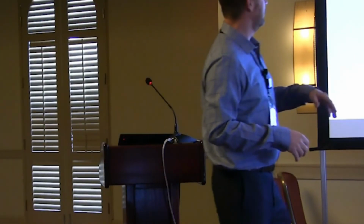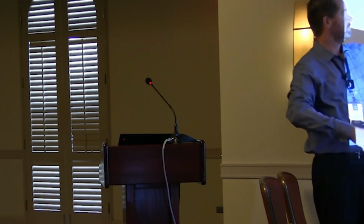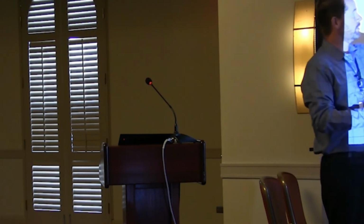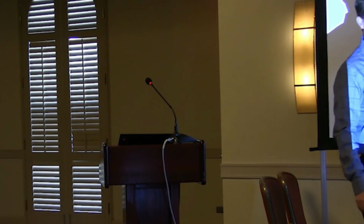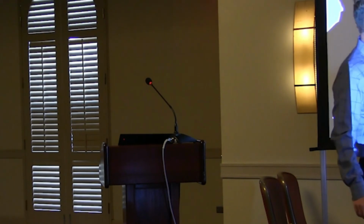So in this new kind of work planning capability, you can set up a charter that says, we're going to Fort Hood. This is our charter. We're going to put in the scope of work. We're going to put in the user identities and the roles, and we're going to say, we need to have a program manager approve that charter. And we're going to have some pre-assessment questionnaires that are the same questions we ask for every building, and we're going to have all of our documents managed in this pre-assessment area. And then we're going to provide a group the ability to perform an assessment. We're going to review their data, give it approval.